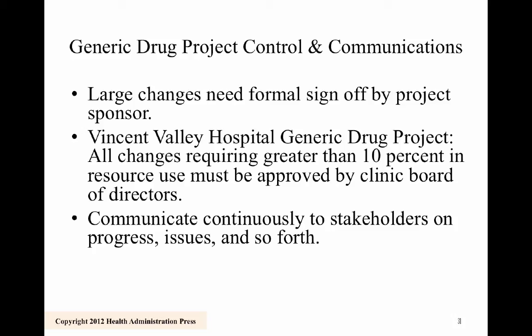So in a generic drug project example, maybe they have some things like large changes need formal sign-off by the project sponsor. Or all changes requiring greater than a 10% increase or change in resource use must be approved by the board of directors. So you have these things built into your project charter, and if these things occur, then that's the direction you take.